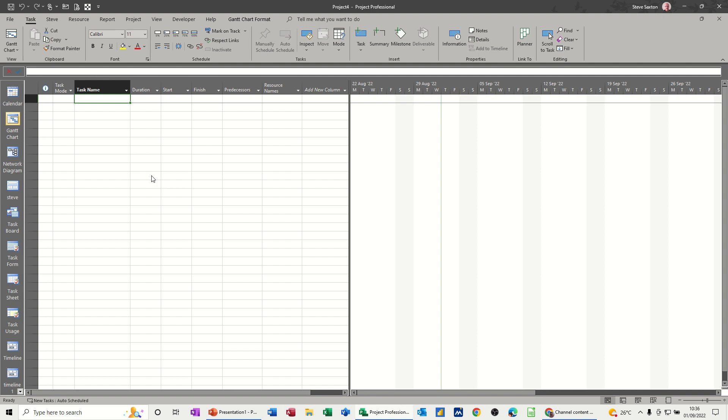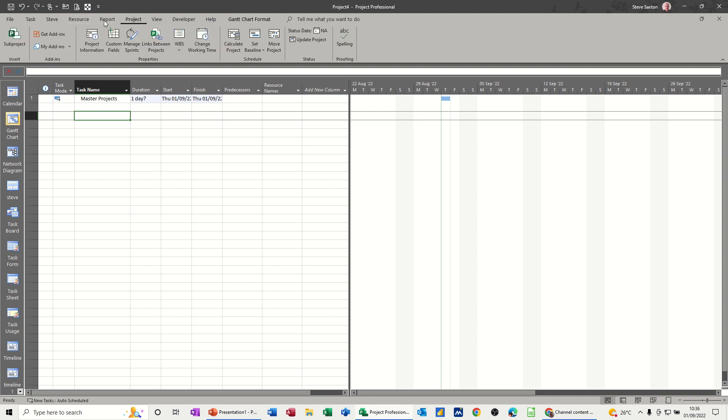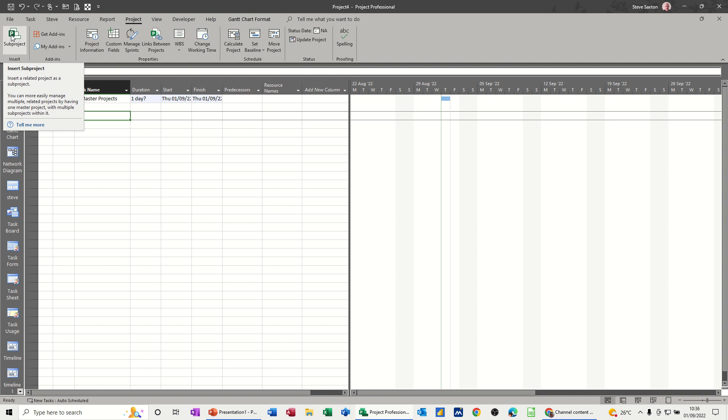First of all, I'm going to create a master project file. I'll call this one Master Projects, and then I'm going to insert two project files. There's just one way of doing it. I'll go to the Project tab and select Sub Project.